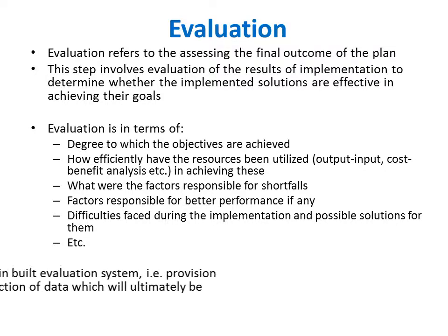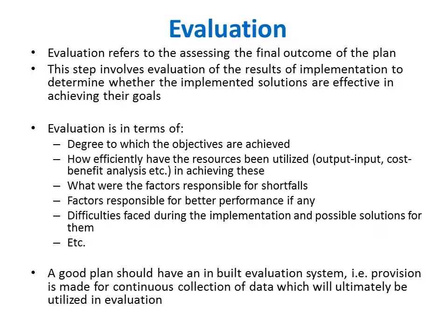A good plan would have an inbuilt evaluation system. That is, there is a provision from the very beginning of continuous collection of data which ultimately will be used for evaluation. The monitoring data is also used in evaluation. So monitoring data is a part of the evaluation data.